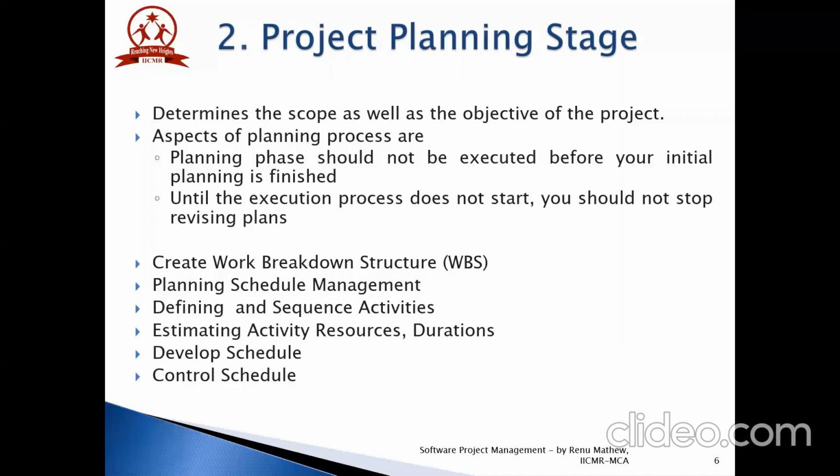Once the schedule management plan is done, the activities should be defined. Defining activities is the procedure for documenting and identifying specific actions to be performed to produce the project deliverables. Each work package is broken down into individual schedule activities. The inputs for defining activities are the schedule management plan, the scope baseline, enterprise environmental factors, and organizational process assets. While the outputs are the activity list, activity attributes, and milestone list.